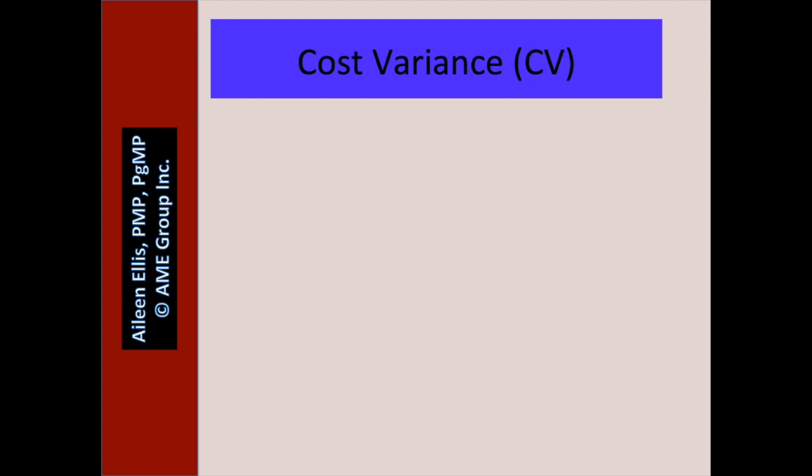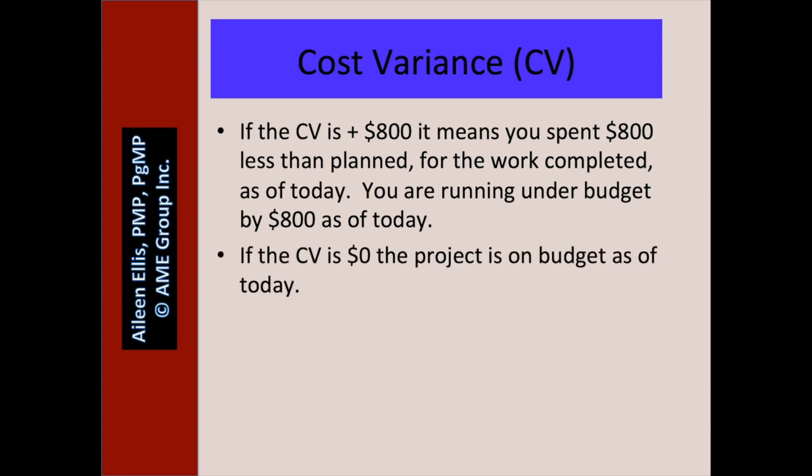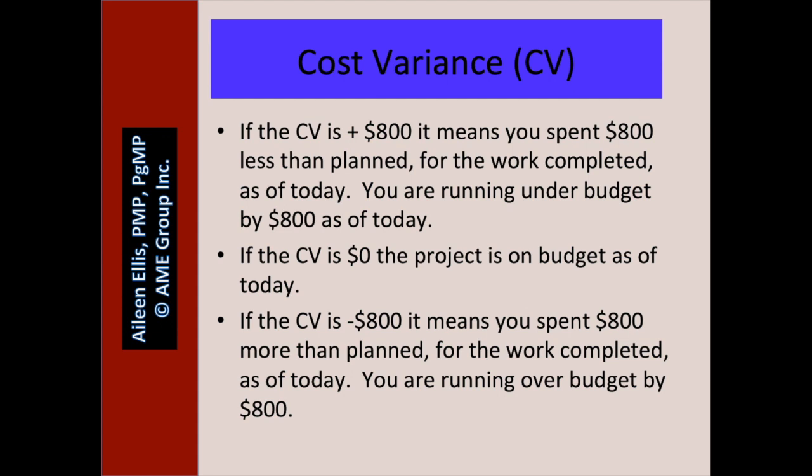Let's add a little more with an example. If the cost variance is a positive $800, it means you spent $800 less than planned for the work completed as of today — you are running under budget by $800. If the cost variance is zero, the project is on budget as of today. And if the cost variance is a negative $800, it means you spent $800 more than planned for the work completed as of today — you are running over budget by $800.